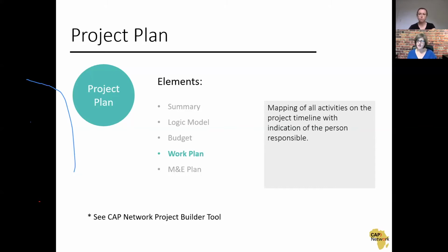So from a project implementation perspective, that's probably an 8 to 10-month project. Not a 12-month project, because you're going to have to allow time for gearing up, for hiring staff, potentially for building the relationships, for getting started, and you're going to have to allow time at the end for your monitoring, evaluation, and reporting back to that funder.